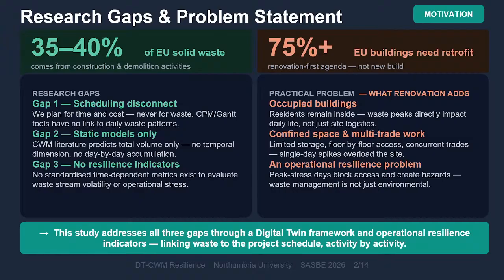And waste is always quantified at the project level, not at the activity level, so we don't link waste to activities or the project schedule. Also, there are no quantitative resilience indicators that can tell us when the waste stream is volatile or operationally risky.